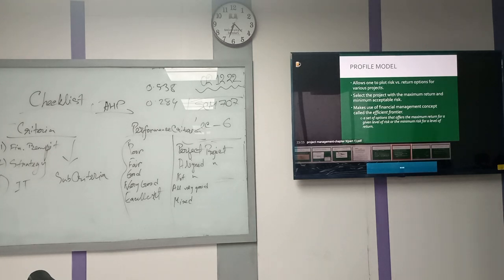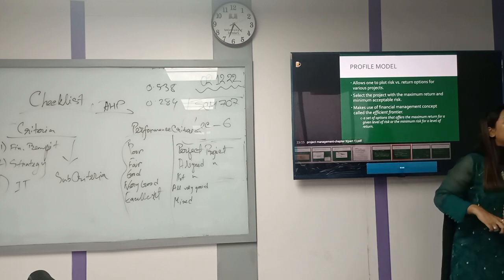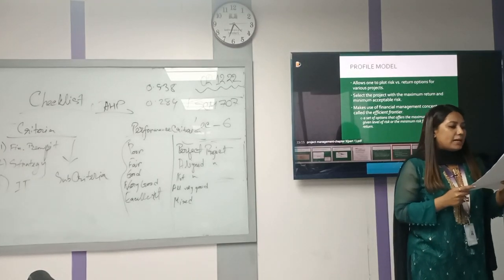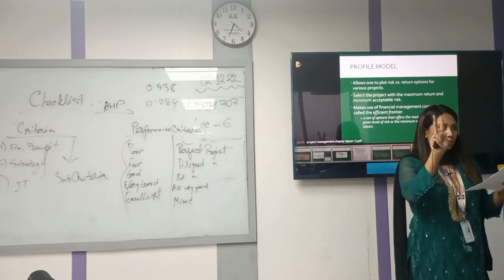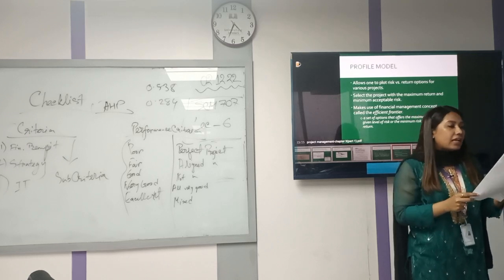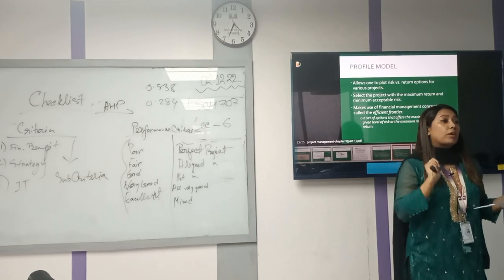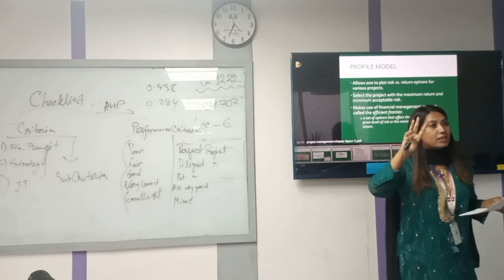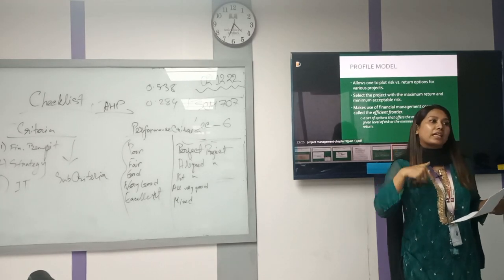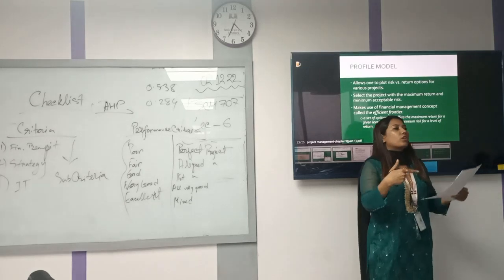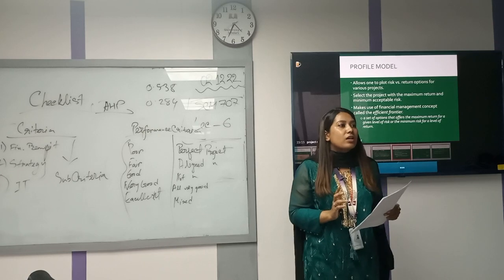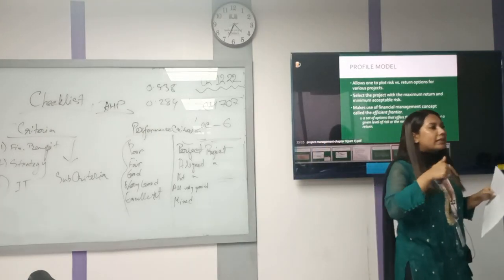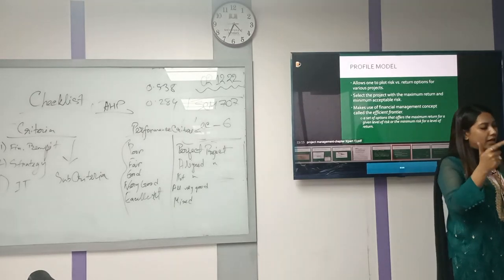Acha. So now come to Pinkman and Fringe. Both of them have a total score of 8. But now look at the performance score. In Pinkman, in case of market share, their performance was 2. In Fringe, in case of market share, their performance was 3. They got a higher score in the important criteria, market share. So even though both of these projects have a similar total score, the answer will be Fringe, because in the most important weighted criteria, their performance was better than Pinkman.